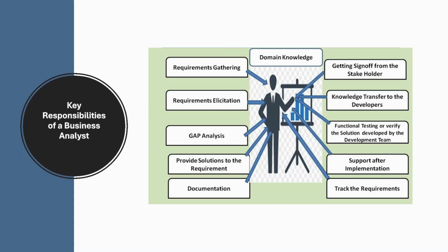Once the requirement is deployed at the client environment, if there is any support needed, for example, any issue or any enhancement required in the current functionality, the business analyst has to assist and solve that, or handle it as a feature request in the next releases, post discussion with the project manager. The business analyst also has to track and monitor requirement changes, ensuring proper traceability and managing the scope of the requirements gathered, post the support and implementation is done.